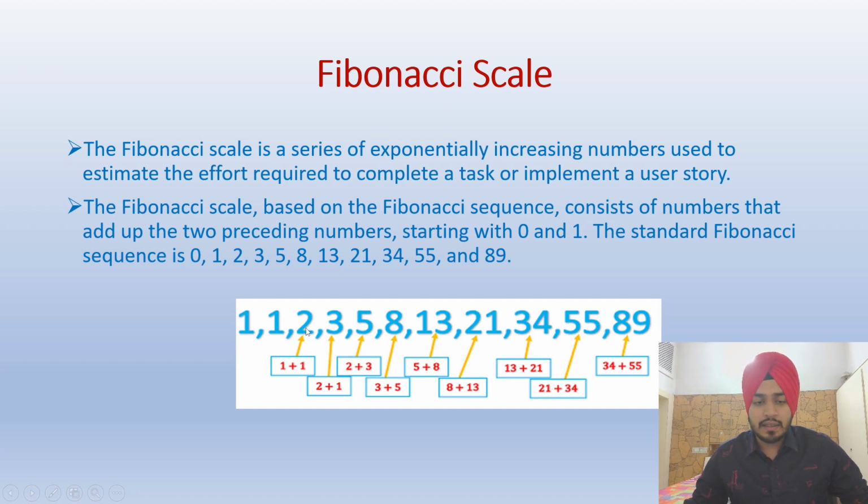So here we can see 1 plus 1, we sum up the previous two story points and we get the next story point. Similarly, if we sum up these two, 1 plus 2, we get 3, 5, 8, 13, 21, and similarly we can evaluate the other story points.